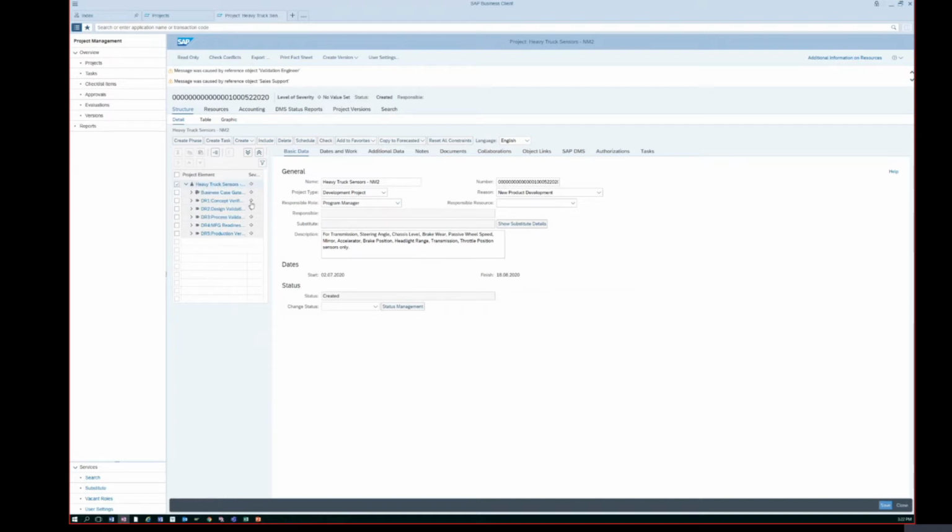The triangle represents the project definition. A project definition contains some general information about the project. Then we see the phases, from which the project is divided on the basis of time. We also see the checklist and checklist items assigned to the project definition.